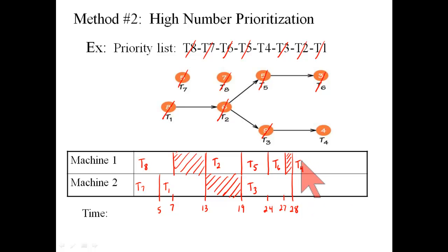By the way, when both machines are ready for a job and there's one job to be done, it's traditional to give it to the lowest numbered machine, machine 1, instead of machine 2. That's completely arbitrary, but that's the decision that I'm going to make each time just for consistency. Task 4 is a 4-minute job starting at time 28. We'll take it out to time 32. Meanwhile, machine 2 has nothing to do because all the remaining tasks have been done, and so it idles.